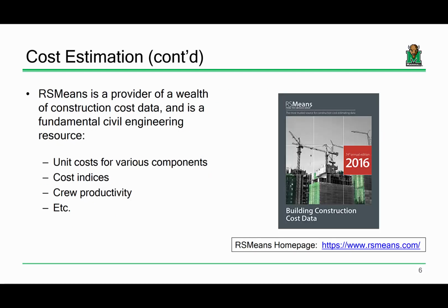I want to introduce you to probably one of the most common construction cost data resources that are available, and that's RSMeans. I'm curious, how many of you have heard of RSMeans? You've heard of that, so I got a couple. RSMeans is basically an organization that compiles just about every single construction cost component that you can think of. They have boatloads of these different guides that list cost data of various components in a construction project. It goes from earthwork to landscaping to site layout to how much the light switches cost to the cost per square foot of carpet. I mean, everything. They have labor costs.